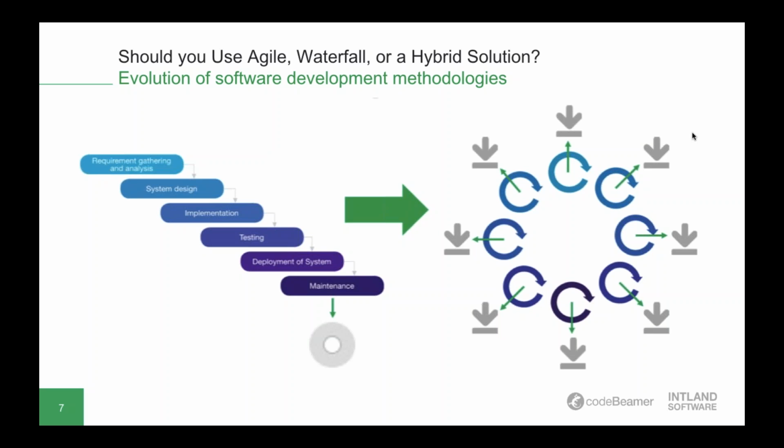And as you will see in our upcoming slides describing waterfall, this method is actually a sequential process with each step of the life cycle following the one before. There are no parallel processes, and work can only progress when the previous stage has been completed. Now, while this approach is really successful in eliminating errors, it doesn't really give you too much freedom.